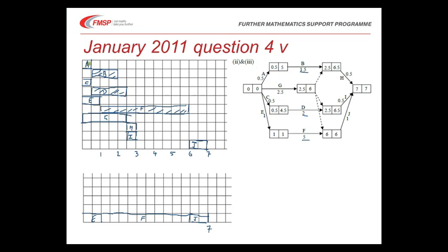So I could start them on A and then B. So if they did A here and then B for 1.5 minutes, that would be fine. Once A's completed, this person could then start activity C, and when that's done, they could set D going for 2 minutes, and again, D doesn't require anyone. When C's done, they could start on G,